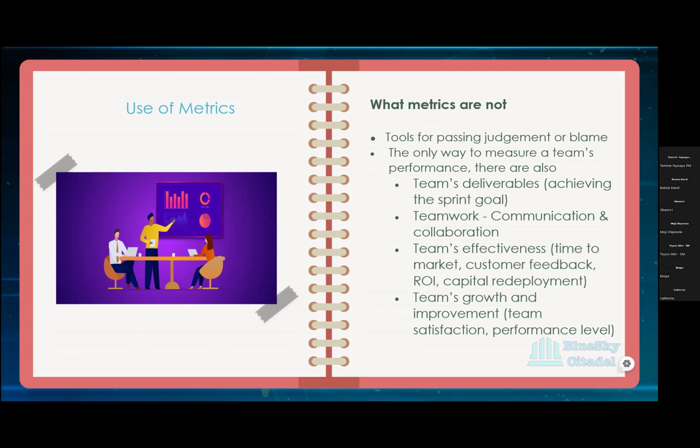With the velocity charts, you can share why stakeholders at times, not all the time, might need to know about your velocity chart: you want to use the average velocity. They come with, oh, you need to do this, you need to do that, we want this, we want that. So if your PO wants to use the velocity chart, it's to be able to tell the stakeholder that this is the team's average velocity. They can't work more than their average velocity. So the PO or the Scrum Master, you're using that to negotiate with the stakeholders.